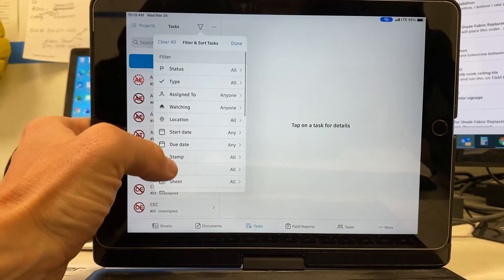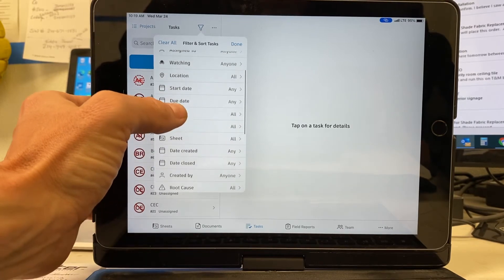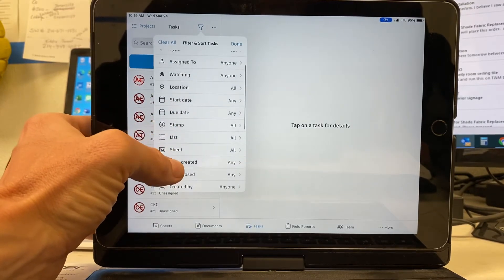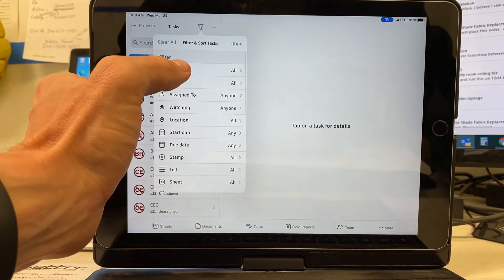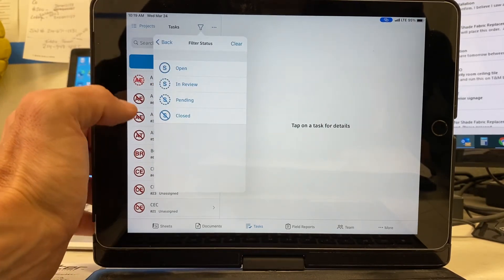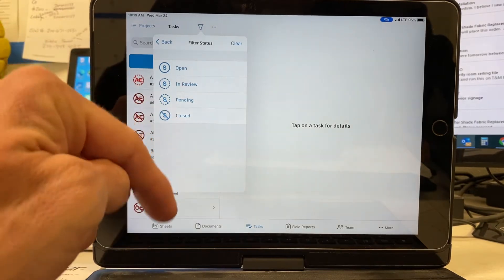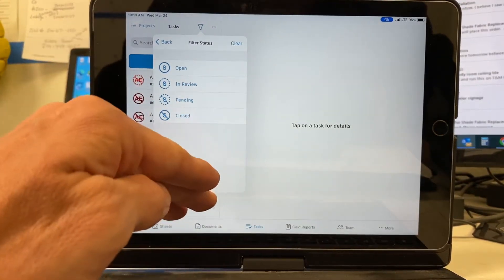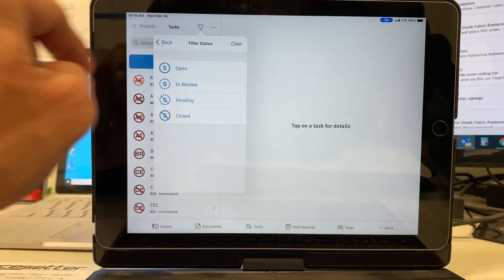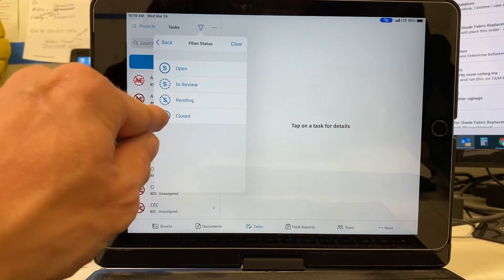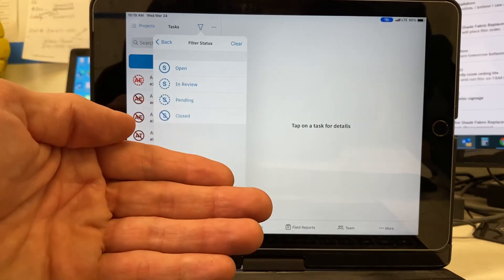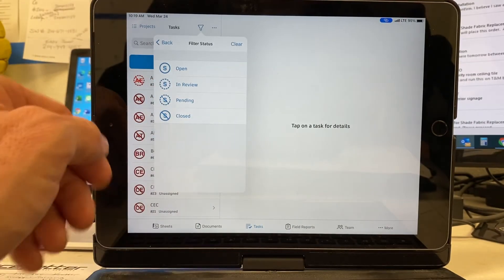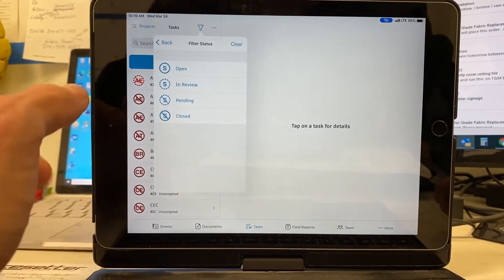Or if you want, you can organize this to where it's only showing under status right here. I have many closed items. I'm going through, and I open my task, and I change the status to open if it's not complete and closed once it has been complete. And then I follow up with a picture showing the before and after of the issue.